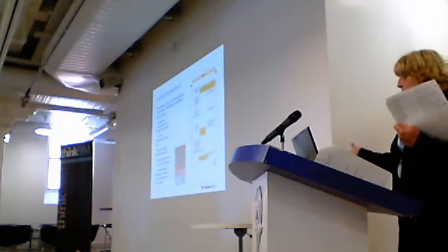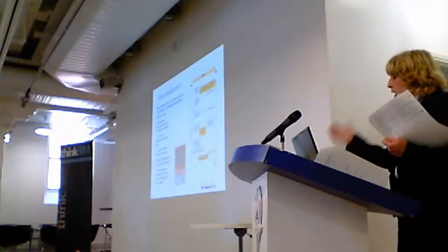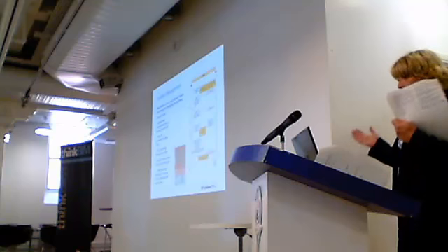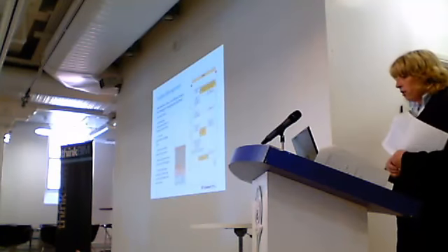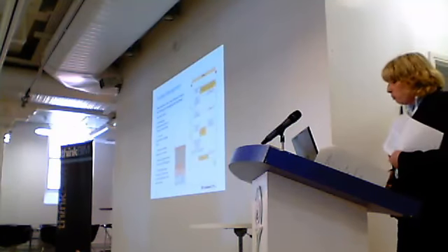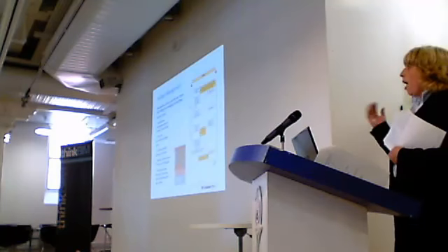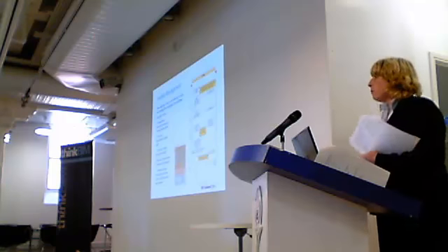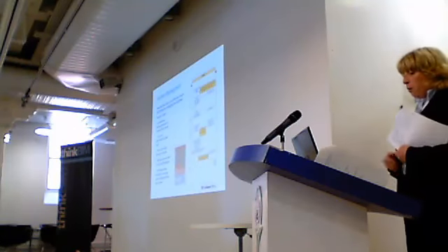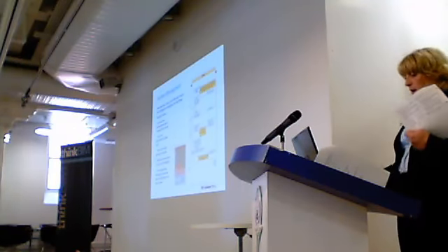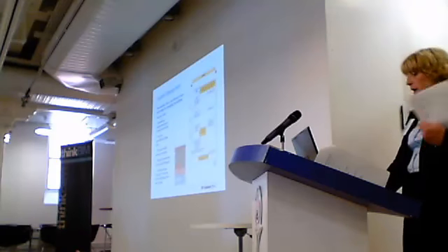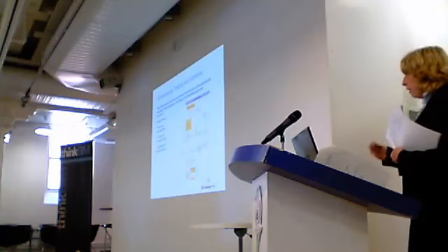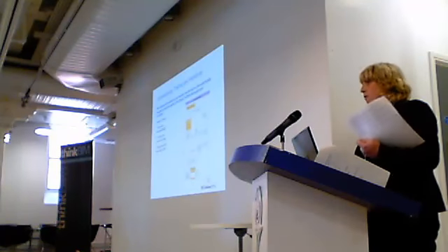Facilities management, a key one, making sure that we have them in at the early stages. So we focus on the operational management at the vision and the brief stages. We focus on the operational budget at the early stages as well. And BIM will enable us to do that because we can put some things in, we can test and we can model it. So it will really help. We'll develop the operational stages very early on, and the commissioning, training and handover into full mobilisation and user guides for the building users.